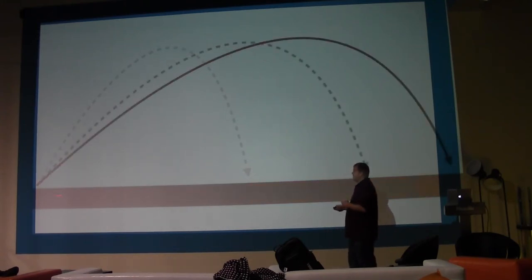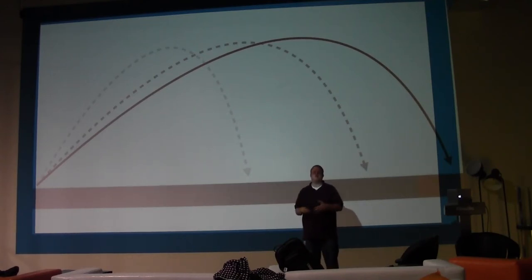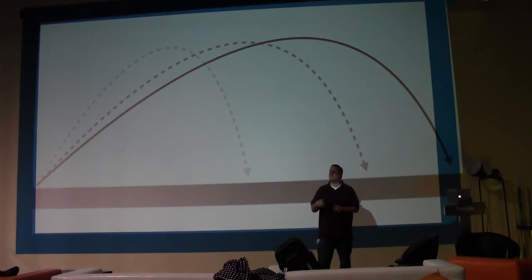Other times, it might look like something like this. After 3 weeks, it's so crazy. And if you're hoping to launch in 3 months, and 3 weeks in it's looking crazy, you want to make the decision now and say, you know what? We're tracking really off. This does not look like something's going to happen. So we need to have a discussion now and make some adjustments instead of waiting until a week before launch and saying, oh, by the way, we got another 3 months before we can launch. Because maybe from a business perspective, that's not viable, or whatever it may be.